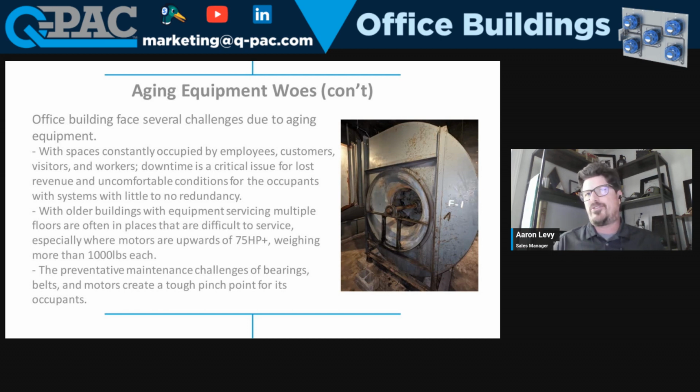What they face with these challenges is that a lot of these occupants are in the building most of the business day, and the only time they really have downtime is either in the evenings or on the weekends. So a Q-PAC system can be installed normally, depending on the size of it, in less than 8 hours after demo. Normally they'll shut down Friday night, start demoing it, be ready to install it on Saturday evening, and by Sunday morning they're up and running, ready for the occupants to come in on Monday, none the wiser that equipment's been serviced.